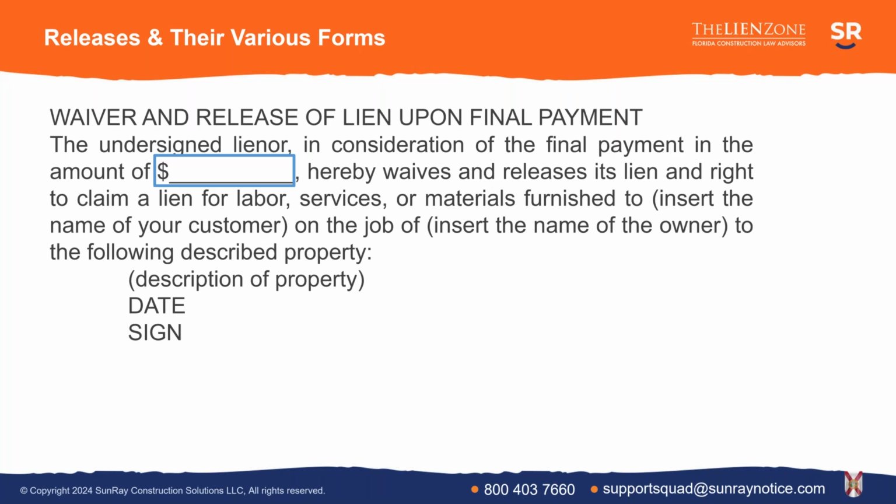Interesting tidbit, you'll notice that there's no notary section on the statutory release forms. It is not legally required to notarize a release, a progress or a final release. Now, everyone is going to expect you to notarize it. People will reject your release if it is not notarized. All of the forms that are ever handed to you will have a notary section on it. It's never worth arguing with someone that, well, the statute doesn't require it. But it is something for you to know that legally you do not need to notarize the release for it to be legally effective.